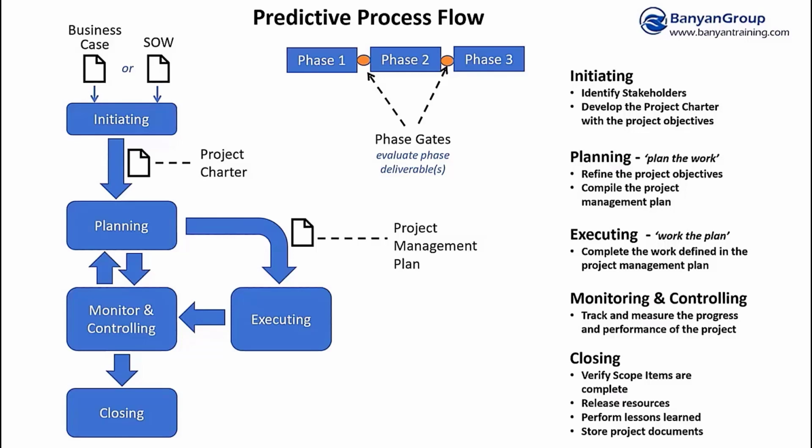Organizations will look and say, well, it looks like, for example, our internal rate of return has decreased to the point where this is no longer as profitable as it was when you originally wrote the business case for this. And so we have other project opportunities that have a better return on investment, a better internal rate of return, and so we're going to transition our resources over to those projects that are more profitable for our organization. So that can happen.